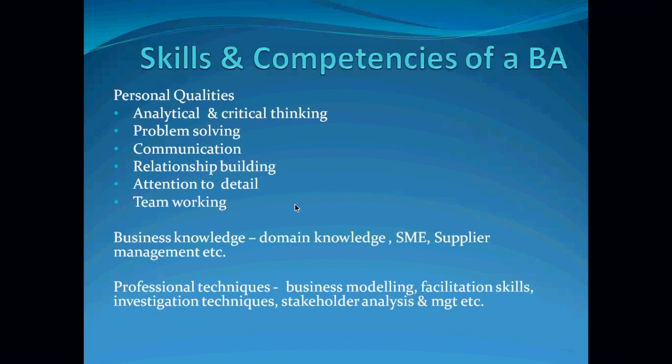So you need to be able to analyze them. For example, if they give you a project and 5 names, you need to understand their roles and find out who the stakeholders are. What is the interest of this person? If you are doing a finance project and you want to roll out a finance application, the person in HR may not even be interested in that, but may have high impact on that project.